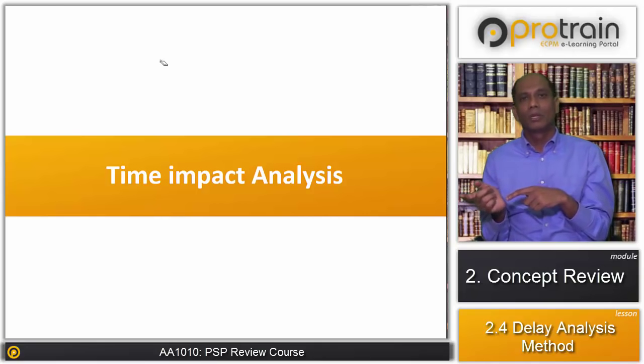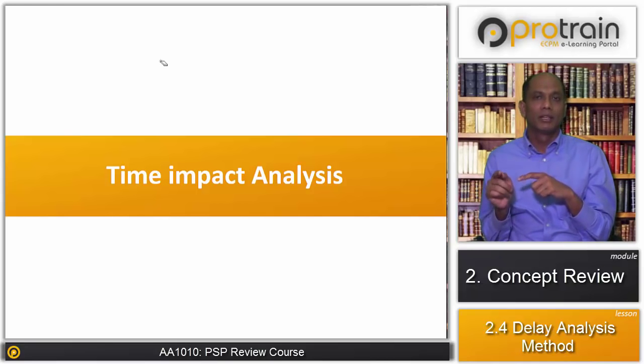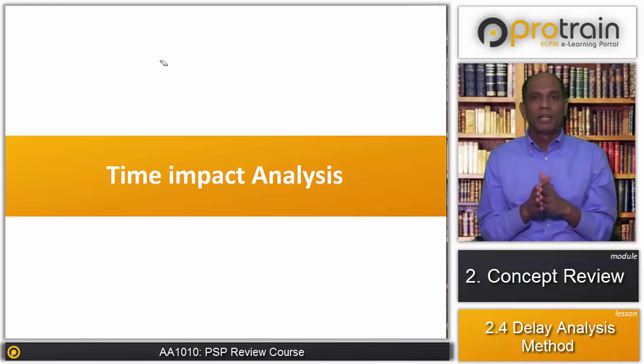When we are talking about the collapsed as-built method, we have completed the project, developed an as-built schedule, and we are analyzing that. But it is not always possible to wait until the project is finished. You want to analyze the delay contemporaneously, during the course of the project, wherein the time impact analysis method comes as a help.